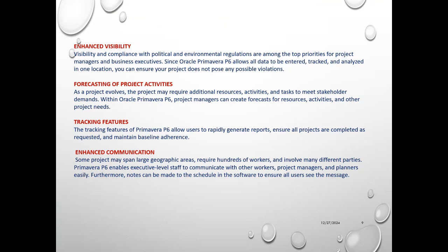In Primavera, you can do a look ahead. Okay, next 3 months: today is 27th December, so 27th January, 27th February. I can do a look ahead for 4 weeks, or for 1 week, 2 weeks, 3 weeks, 4 weeks, 5, 6, any number of days. But for me, I do a look ahead up to a maximum of 3 months only, 12 weeks only. Why?